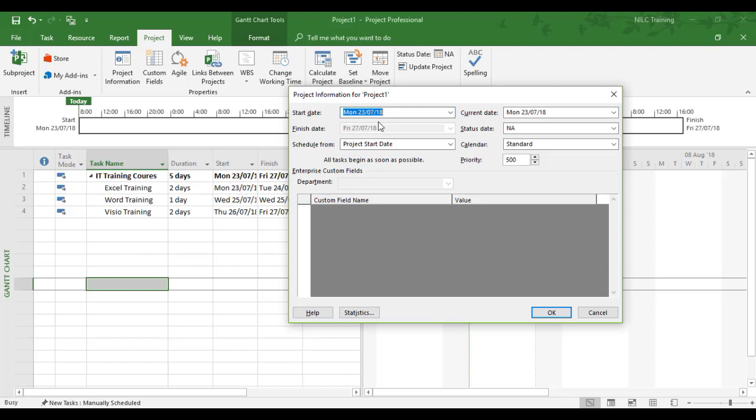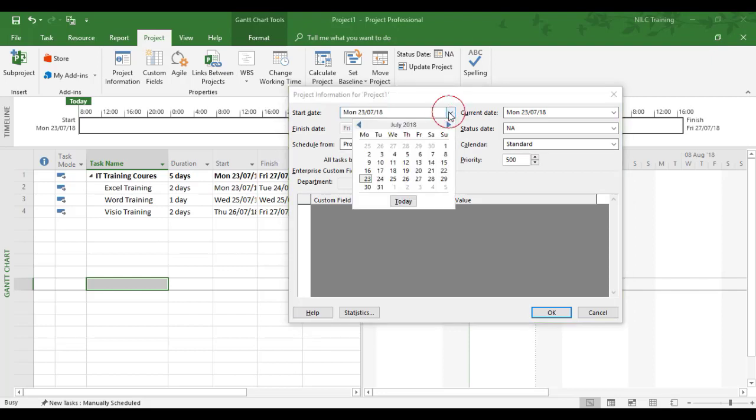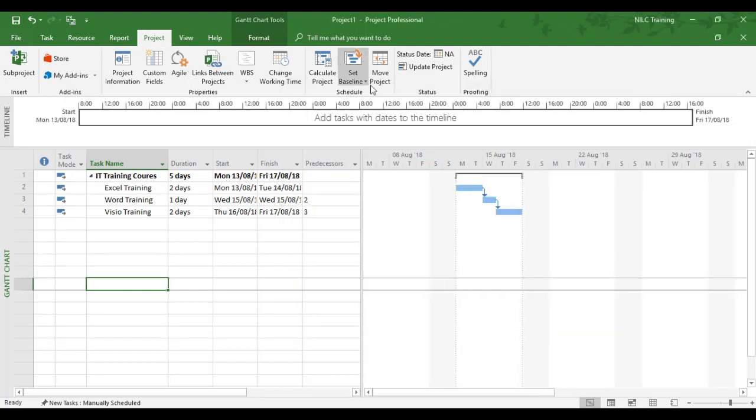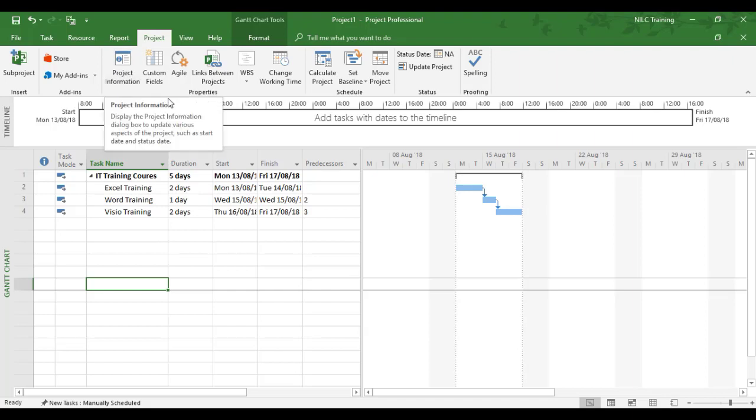If I wanted all three to be in control from one single start date, I can with auto scheduling. Say I wanted this particular block of training courses all to start much later, say on the 13th of August. I can change the start date and they all move on to the 13th of August.